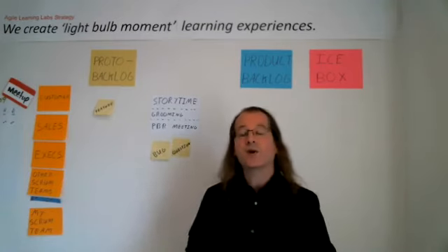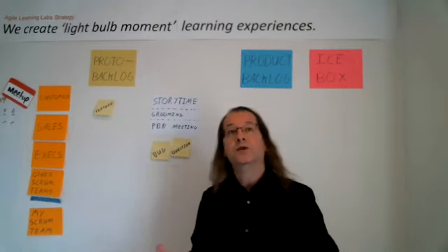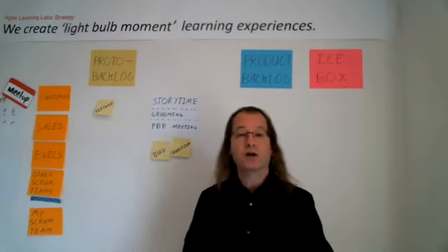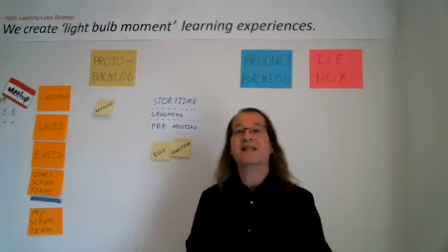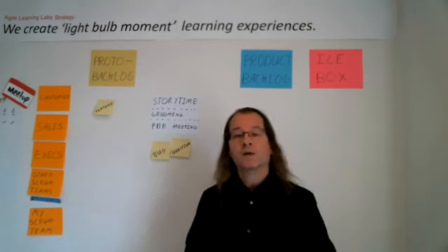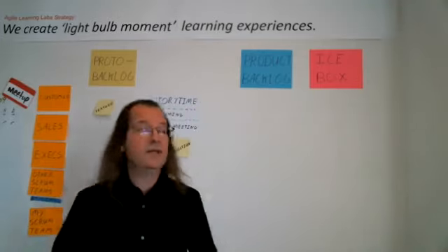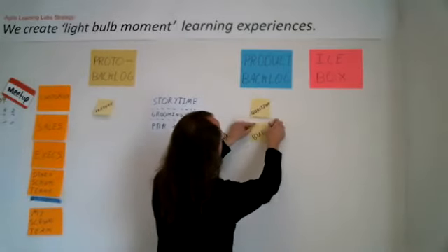And so now the product owner really has all the information they need to decide, do they want to put this in the product backlog or not, right? Some things are, hey, that's a nice idea, but wow, it turns out the estimate looks huge. It's not going to be a good return on investment to do that. Whereas other things look very promising, the product owner does want to pursue them, and so we take them and they go into the product backlog, right?